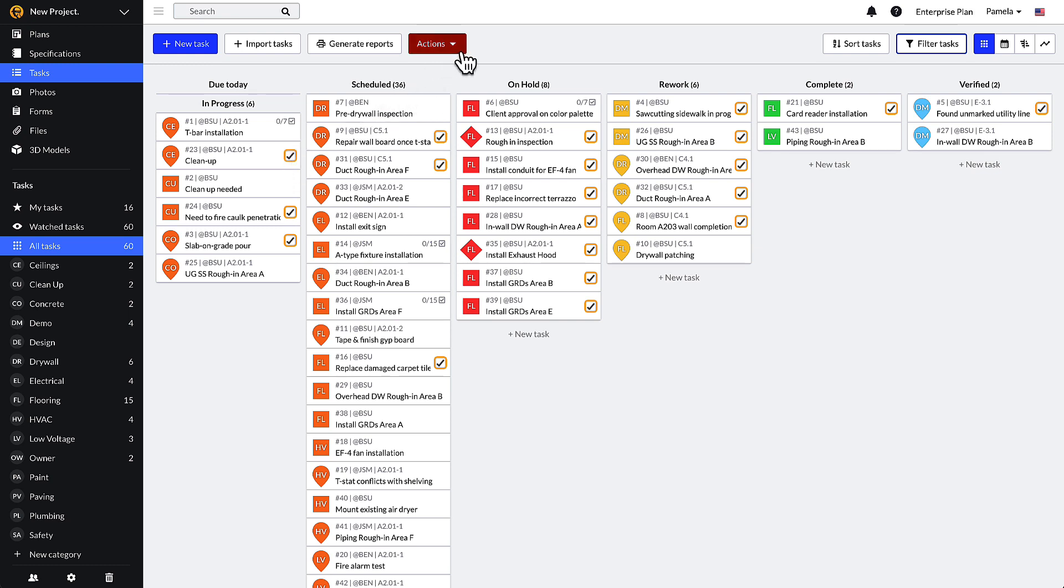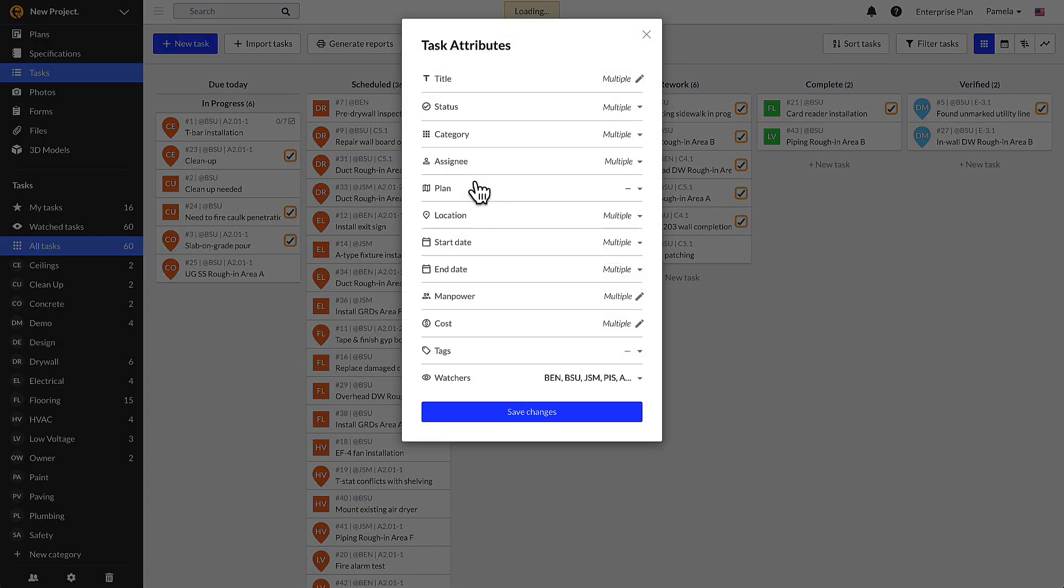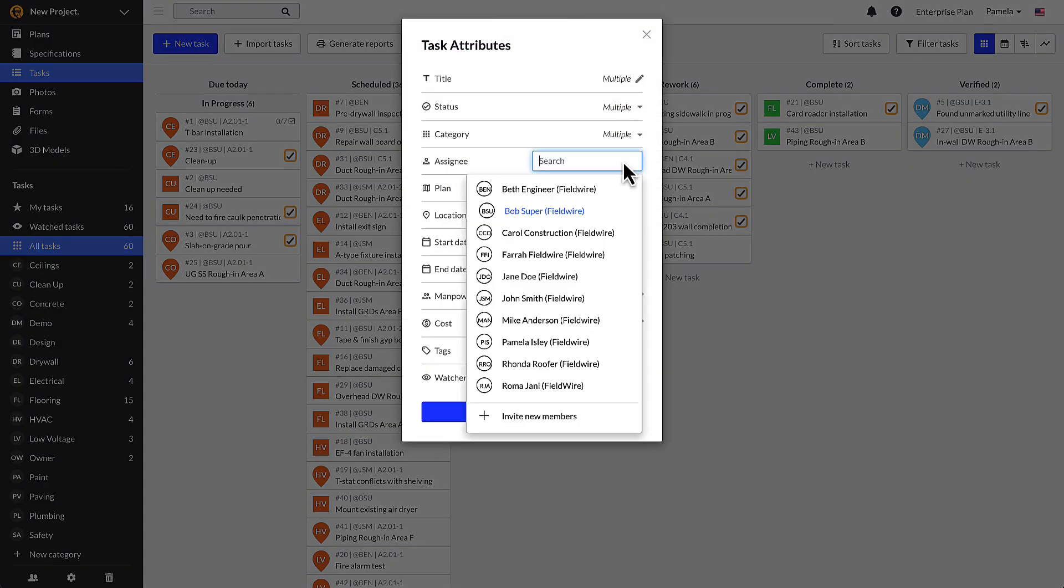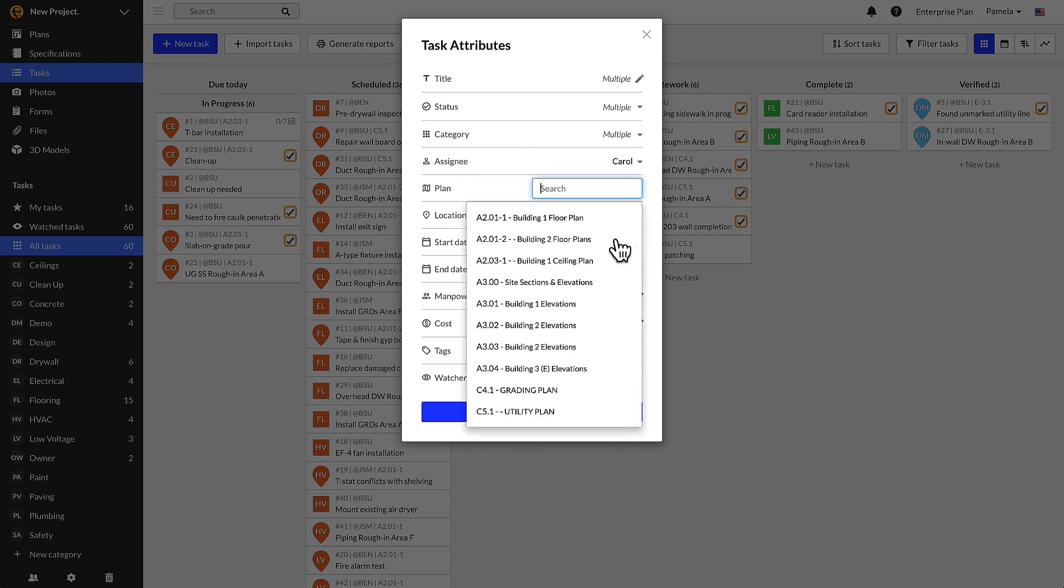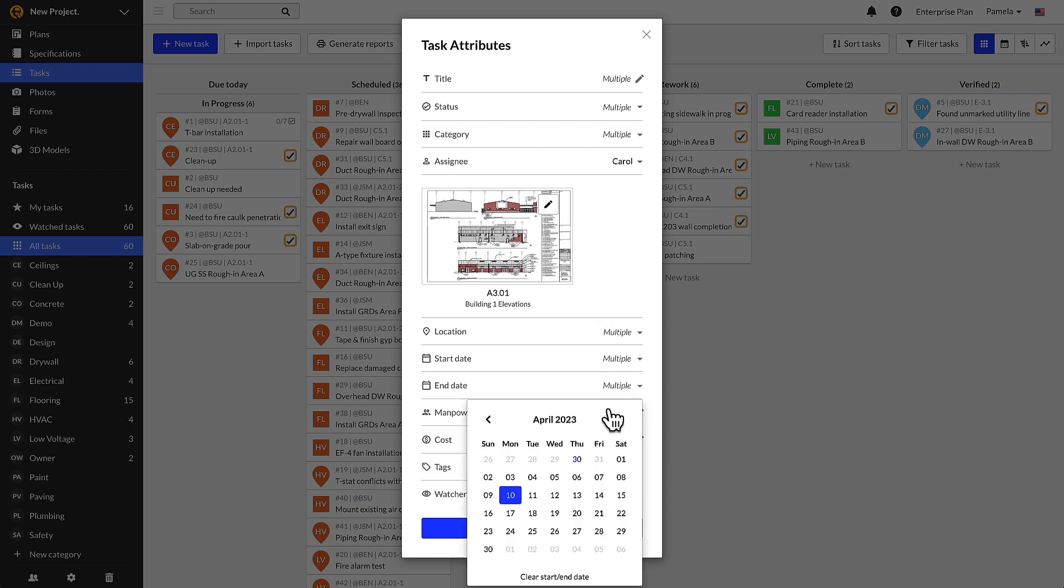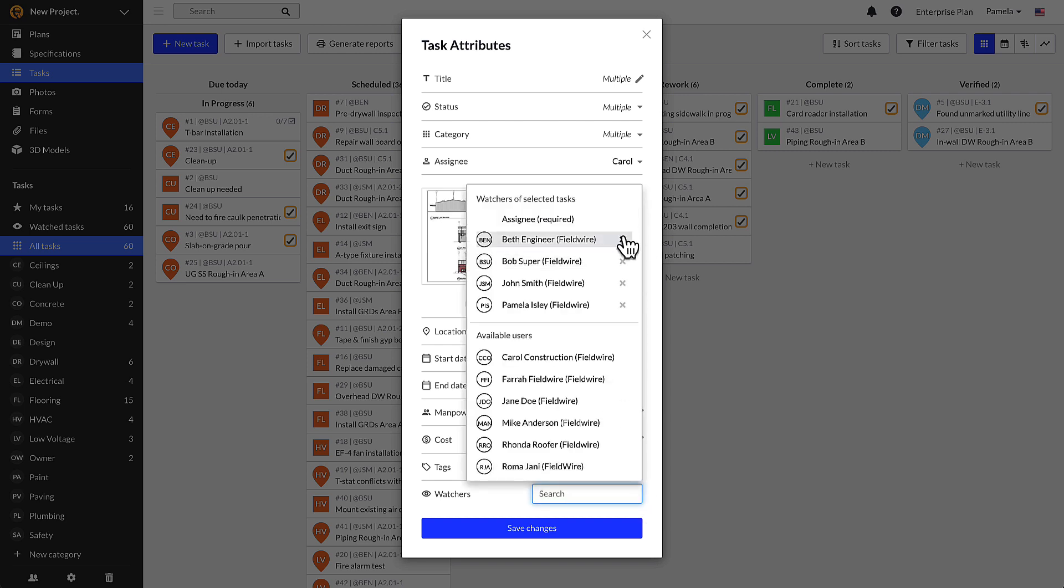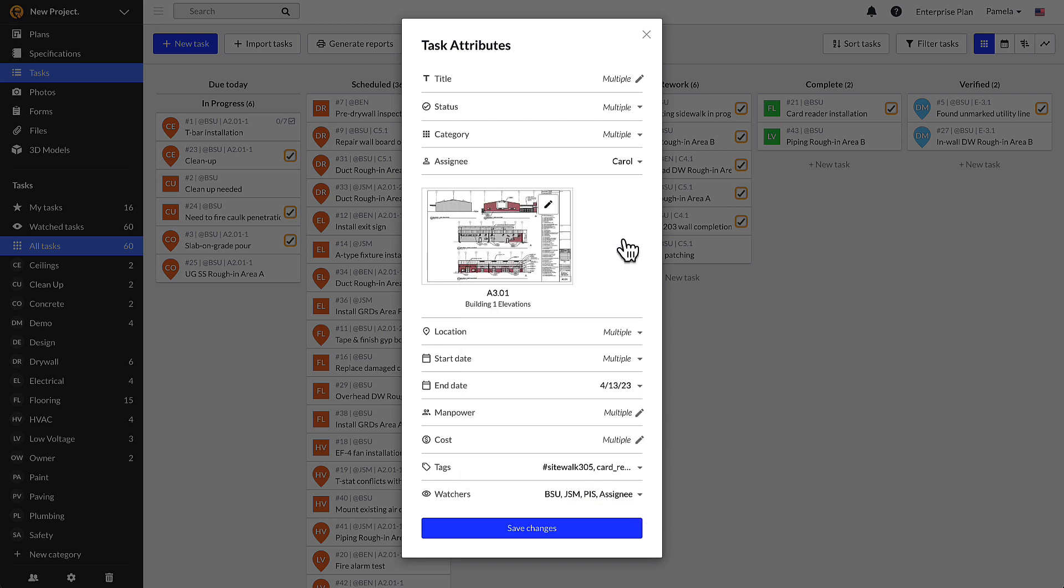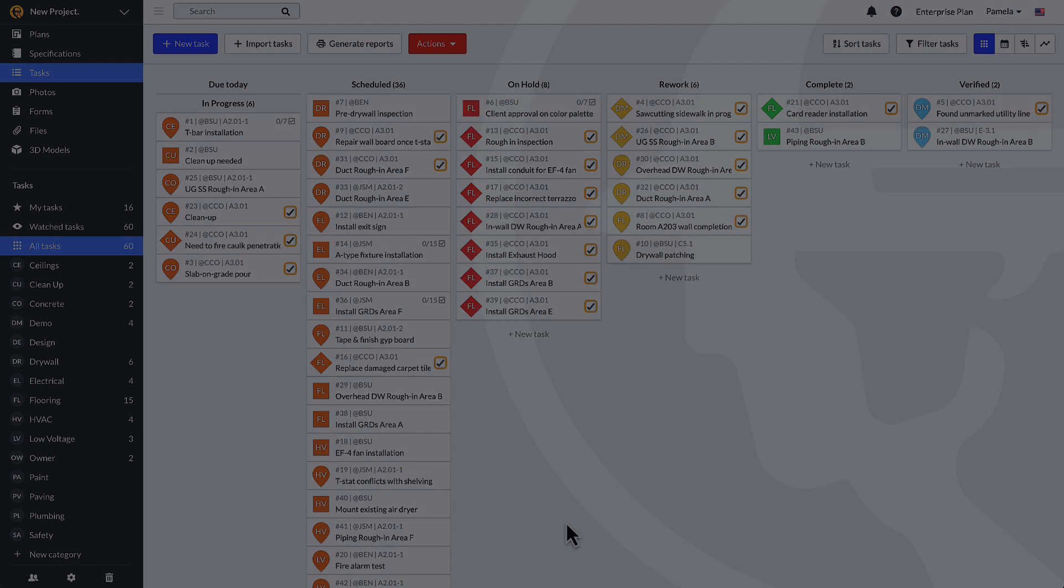After your tasks have been selected, click on the Actions button at the top of the Tasks page, which will turn red once you've selected multiple tasks, and select Batch edit to update the task attributes. You will then see the Batch edit task attributes window pop up on your screen. From here, you can update the task attributes for the selected tasks. You can even add or remove watchers on multiple tasks at once by using this feature. Then click Save Changes at the bottom.